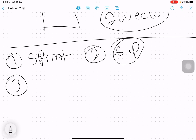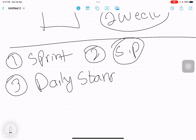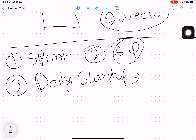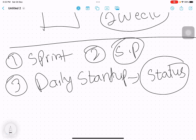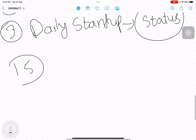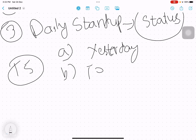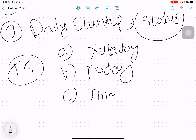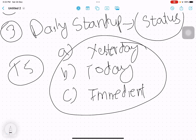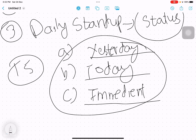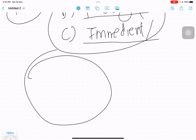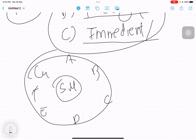The next ceremony is the daily stand-up, sometimes called the daily scrum. It's a status-sharing meeting that lasts 15 minutes. Three questions are answered: What have you done yesterday? What are you going to do today? Are there any roadblocks or impediments? All team members stand — scrum master stands in the middle and goes around asking each person to share their status.